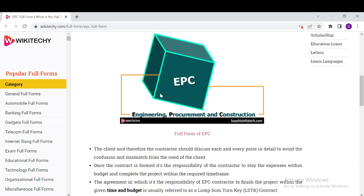The contract also includes project deadlines and the amount to be paid. Once the contract is formed, the responsibility of the contractor is to stay within the budget and complete the process within the required time frame. The agreement holds the EPC contractor responsible to finish the project within the given time and budget. It is usually referred to as a lump sum turnkey.